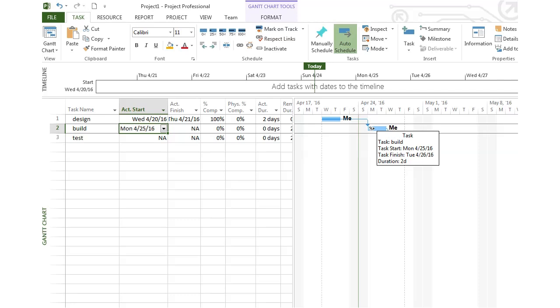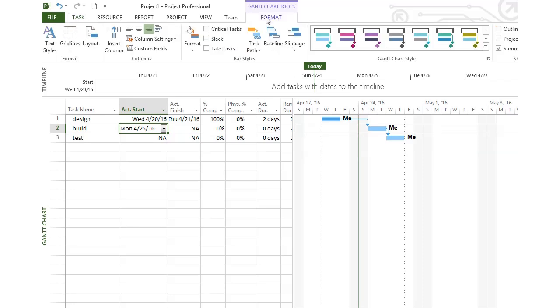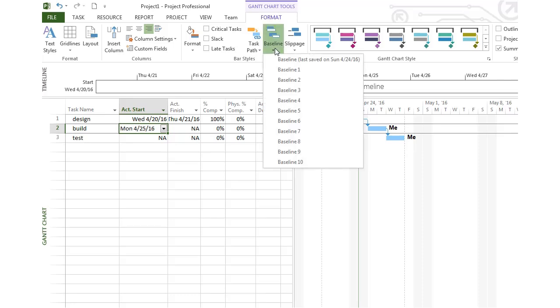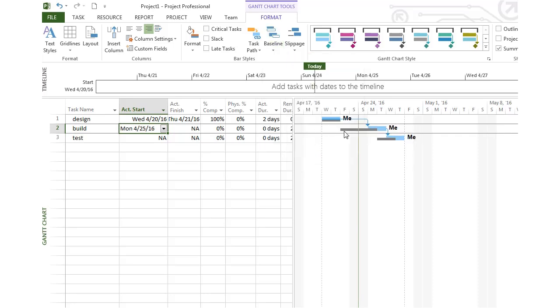And that's fine, but I lost my view of the baseline of my original estimate. So I can look at that baseline in comparison to how my project's doing by going to the format tab and choosing baseline. There's more than one baseline that can be set, but I've only set one of them. So I'll select that baseline. My baseline will show up in gray under the current progress of my project.